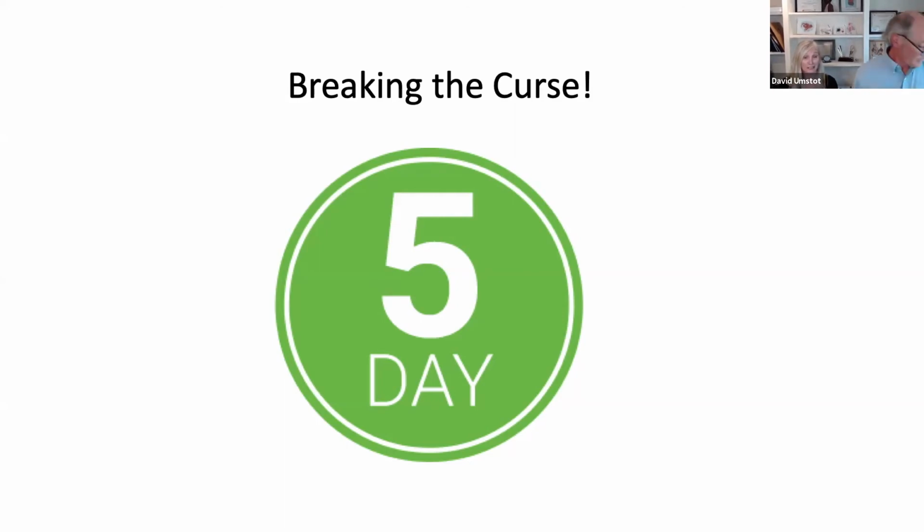And that's why the daily huddle is so important, so everyone understands exactly what's being accomplished each day and what's going to be accomplished the next day. If a crew is taking an extra day to do something, the follow-up crew understands that, so they're not going to show up at the site, or they're going to be doing something else on the site, not what they had originally planned. So it helps everybody understand, so the work continues to flow and the project keeps getting better.